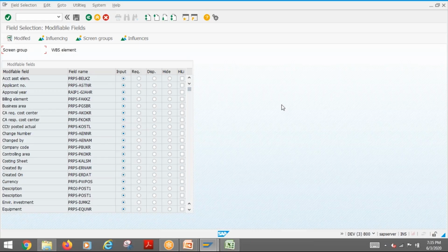Yes, there is some superior not matching. By mistake I created it. What happened is that you gave a wrong number for the superior. Up to level 2, you need to create only -01, but for level 2 you gave -01, so it is supposed to be level 3. The system is saying your level is not proper as per your coding mask, so you need to move that level down. The derived structure will help you notice wherever the mismatch has happened.